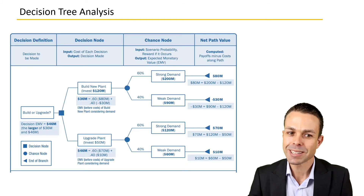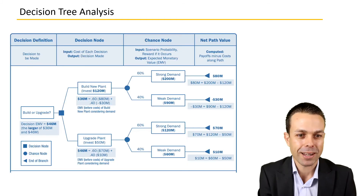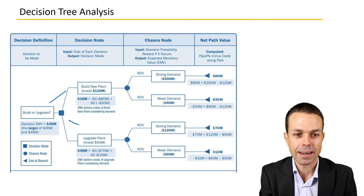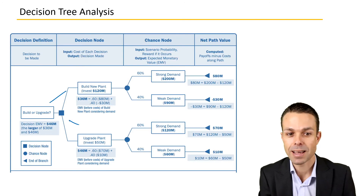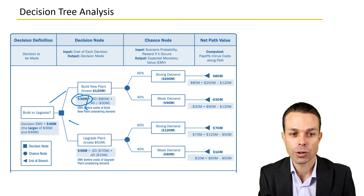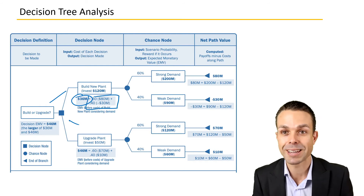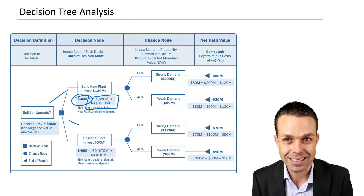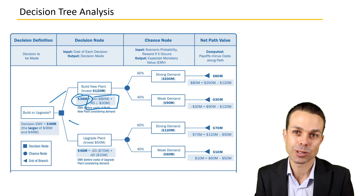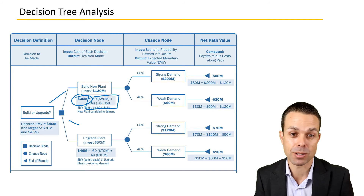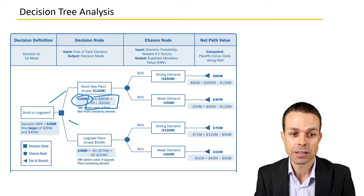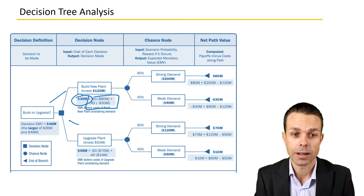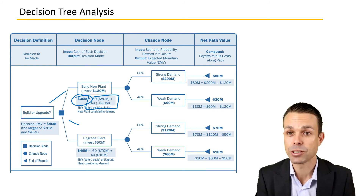Here is an example of what that looks like. As you can see, we've got the different branches of the tree, and each one has a cost associated with it, and also potentially the probability and impact of the risks associated with that decision path.